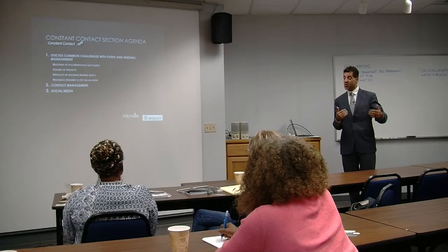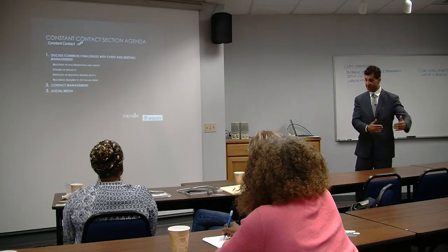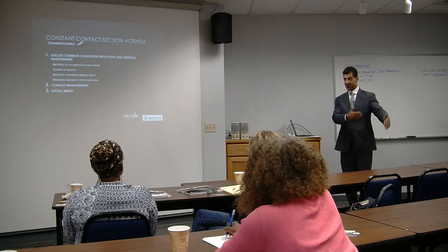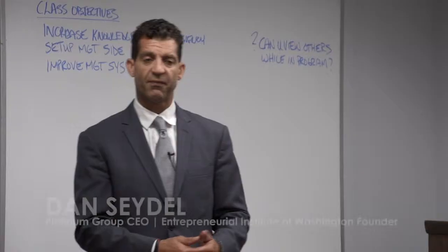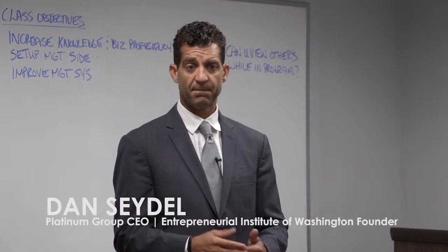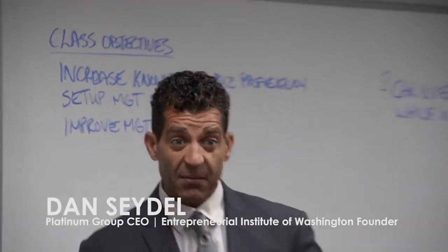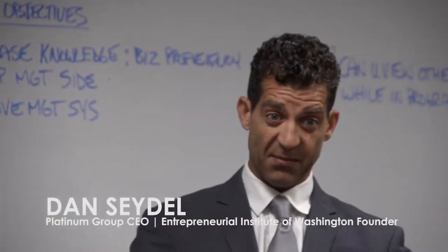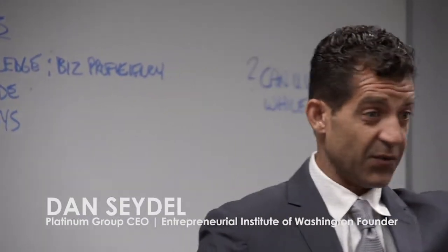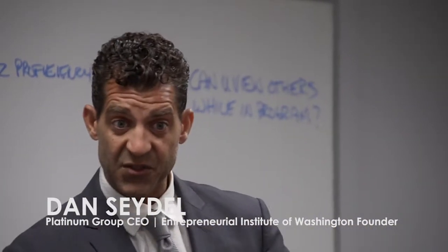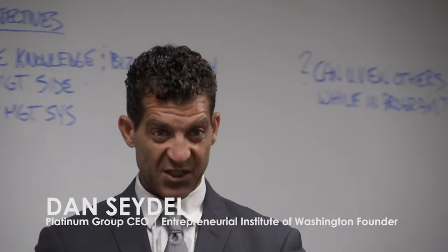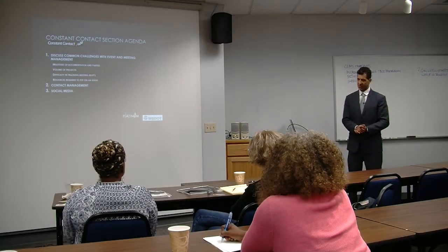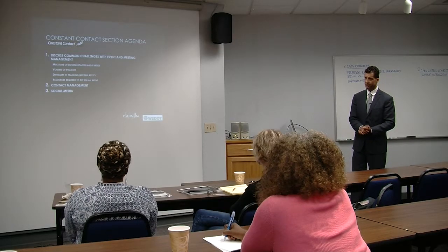Okay. You may want to use it because there are some procurement tools that could be helpful for you. Like what? For instance, submittals. Okay. Sometimes there's long lead items. Right. Sometimes the submittals are tied to an architect or an owner or someone responding to a request for information. So timeline benchmark type of. Exactly. Critical schedule things, okay.